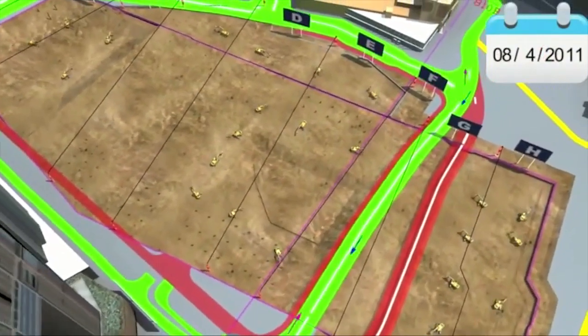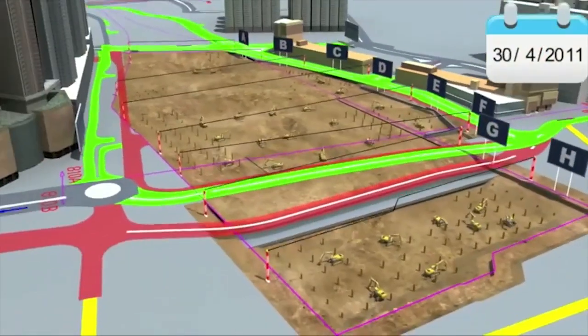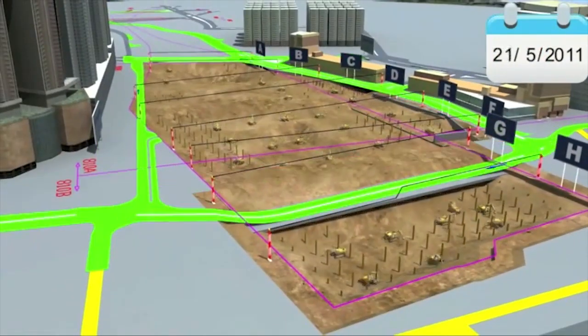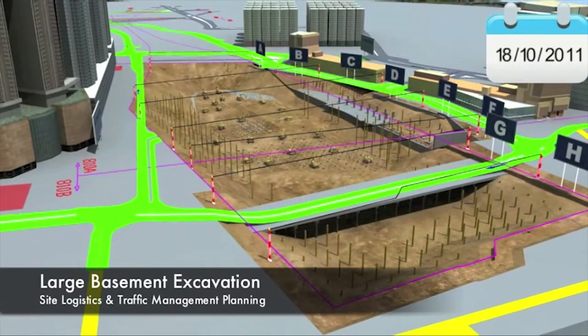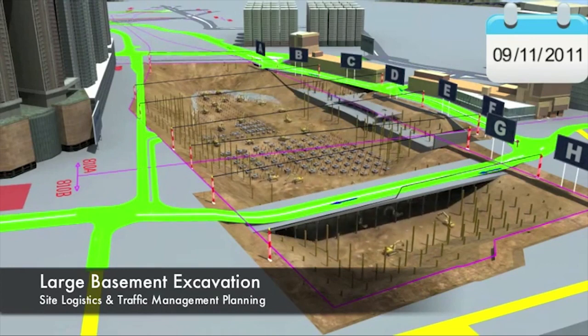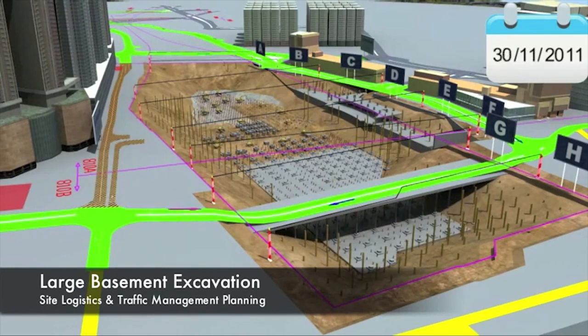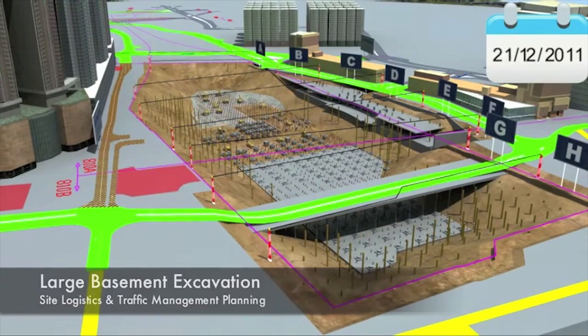We learned so many things because we realized some of the roads were not big enough for the turn for the trucks. We could not back up. So we had to create a lot of analysis, and we actually had to remove some small security offices and things. We had to demo them before we could bring the truck in.